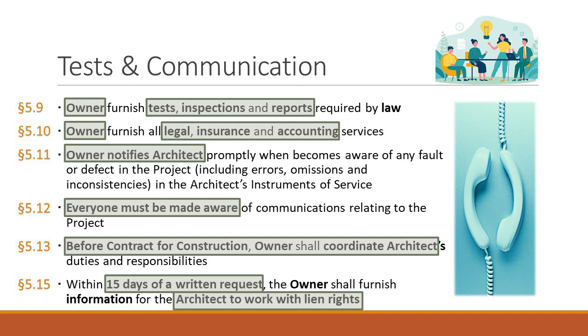So let's go back to my kitchen designer example. If there are edits in the B101, the owner-architect agreement, that recognize the duties and responsibilities of the kitchen designer different from the way this contract is written, I need to make sure the contractor knows that there's a separate kitchen designer, and that's what she's going to be doing on the project. So that's this coordination, coordinating the two contracts together.